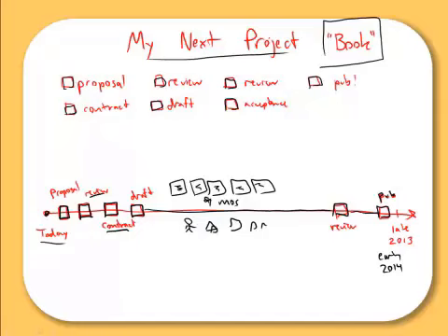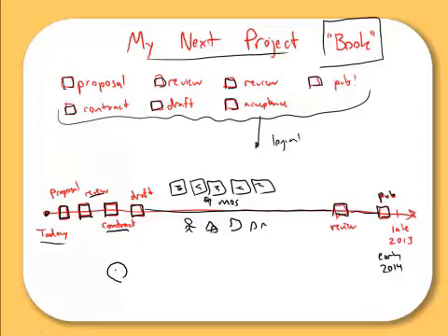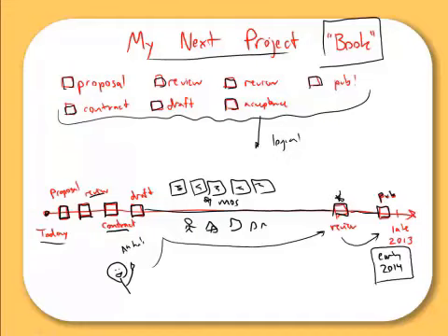And so, of course, the beauty of putting together a timeline is I can take all of these random steps and put them into what appears to be a logical order. That's one of the good things about a timeline. Even more importantly, though, I can see exactly what it is that I need to do in order to get this book to happen. I can say, aha, because I can see it mapped out in this timeline, I can get a sense of where I need to allocate my time, where my critical milestones are that I need to make sure of, and where we end up in time when it's all over.